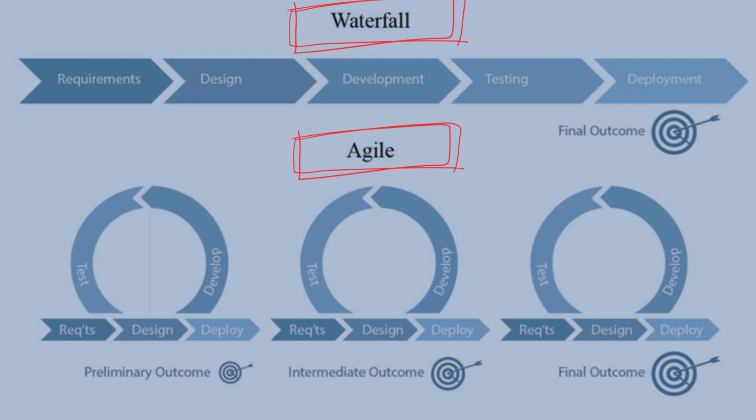As you can see, while the waterfall method goes through each phase only once, the agile approach goes through each phase once per iteration. If you also focus on the outcome and the size of its visual representation, it is equivalent to the size of the completed system or whole system scope. The final outcome we target is the same size, but in the agile approach, we release an incrementally developed system as parts at the end of each iteration, so that the customer interacts with it